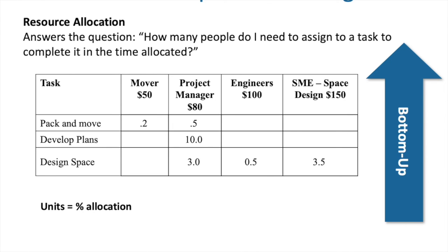So as you can see, in order for us to do that, we have to explore every one of our tasks and extrapolate from that both the cost of resources and the cost for supporting expenses. That becomes very, very, very time consuming. But indeed, it is more accurate and it's used when cost is a critical element.